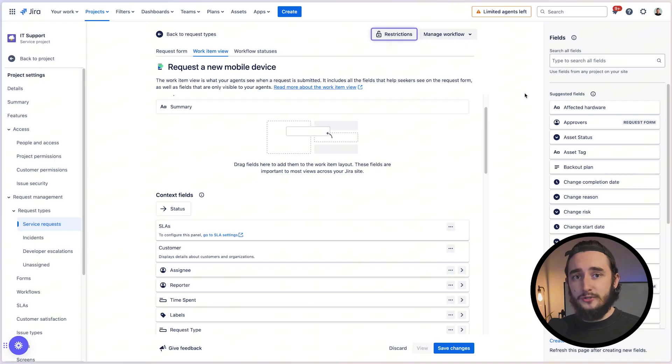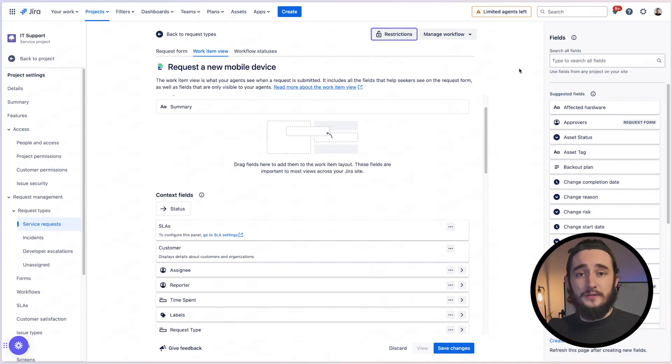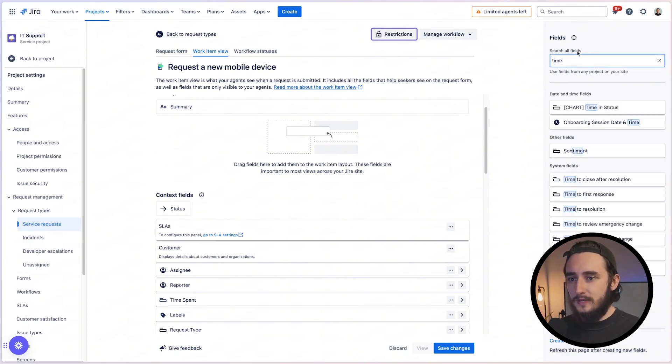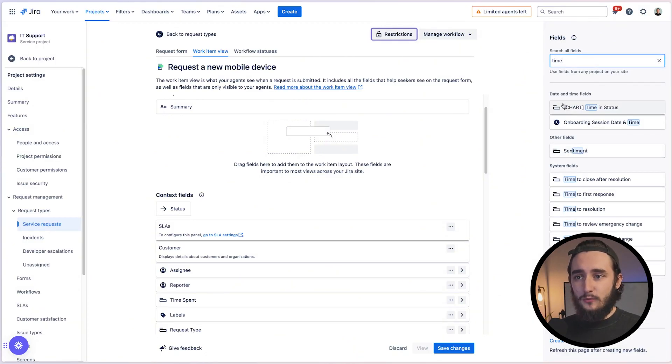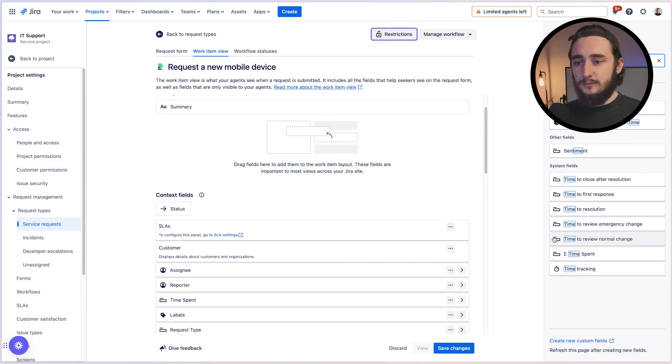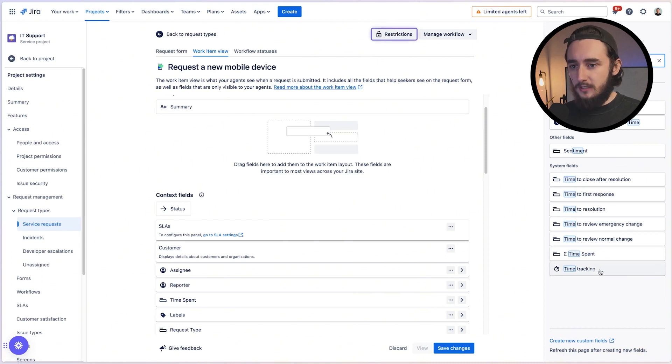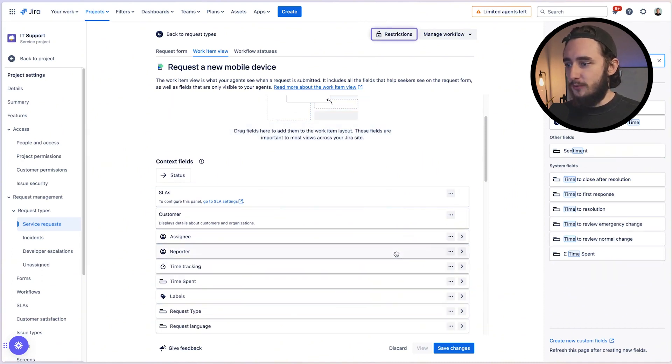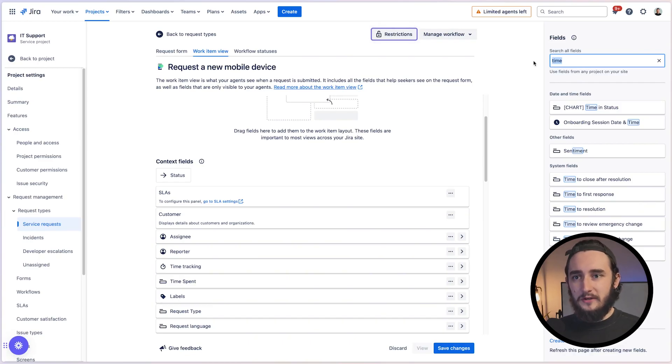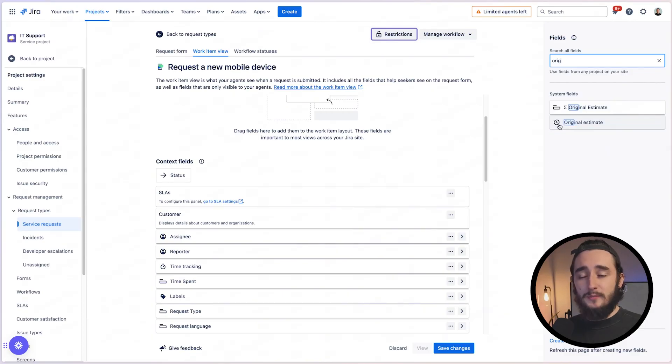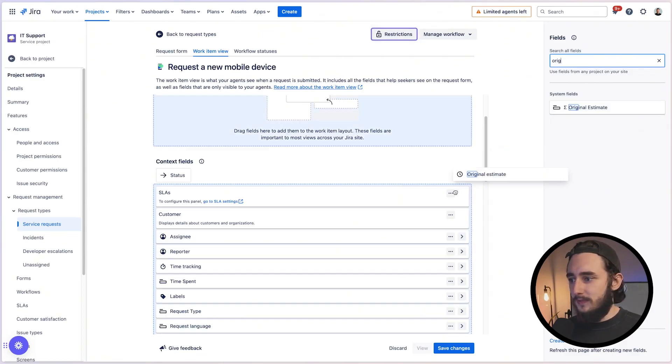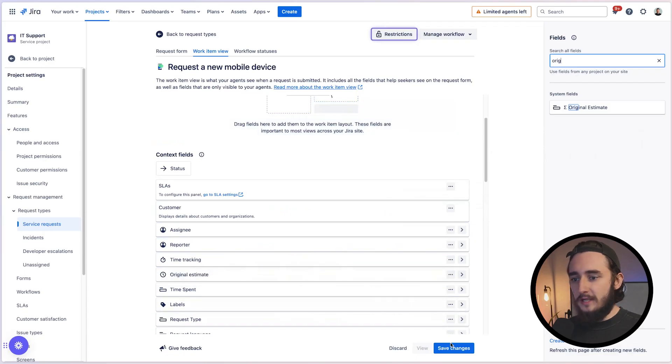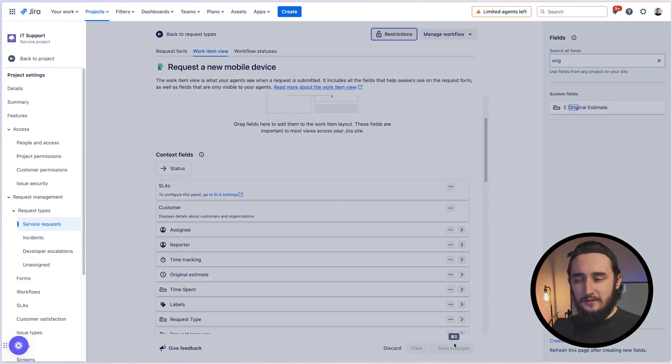This is going to be your screen to configure and edit all of your fields within this ticket. So I'm going to need to make sure that two fields are pulled in here for our time tracking. The first field is going to be called time tracking. So I'll go ahead and just search for time here. And I want to make sure that I pull in the correct field here. I don't want anything that's a date or time field or another field. I want a system field and it has to specifically have this icon here. So I'll pull in the time tracking and I'll throw that in right under reporter. The second field is optional, but I do like to have this and I'll explain why a little bit later. And this field is going to be called original estimate. And once again, make sure you're pulling it in the correct field here with this icon. So I'll pull that in right below time tracking and click save.